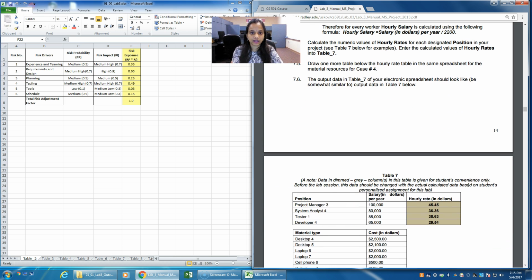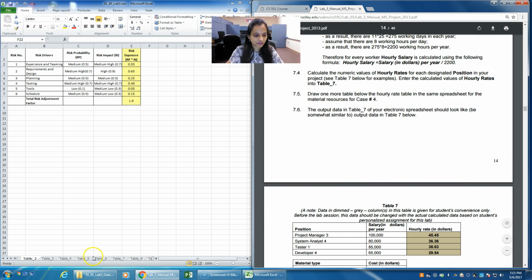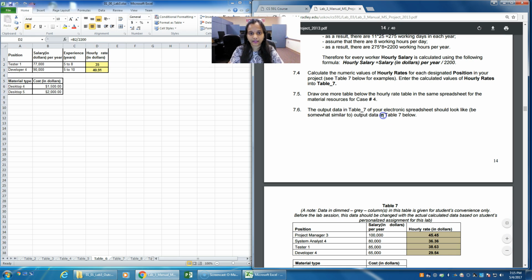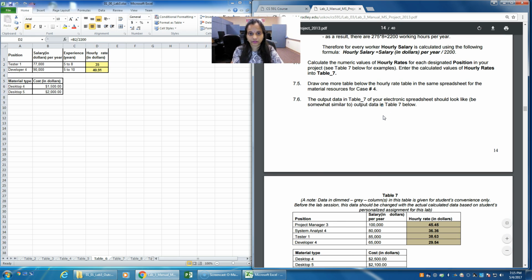We need to calculate the hourly rate. As I've mentioned in my previous videos, the hourly rate is nothing but the total salary per year divided by 2200. When you divide that, you will get the hourly rate for the respective resources.